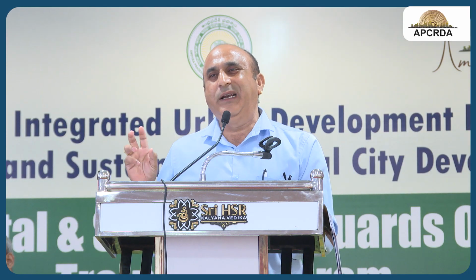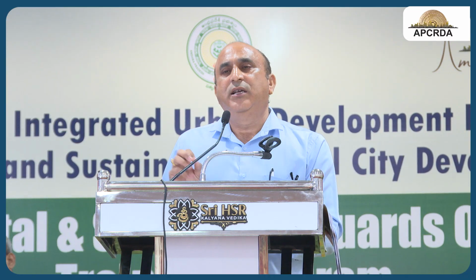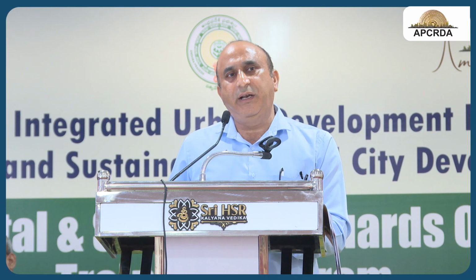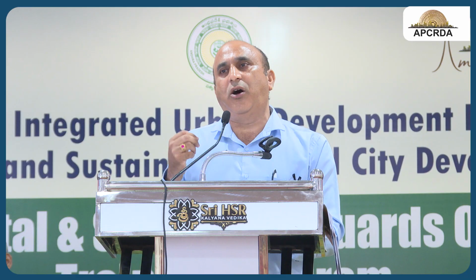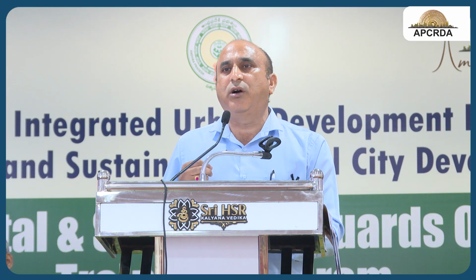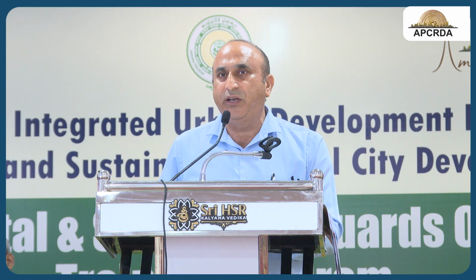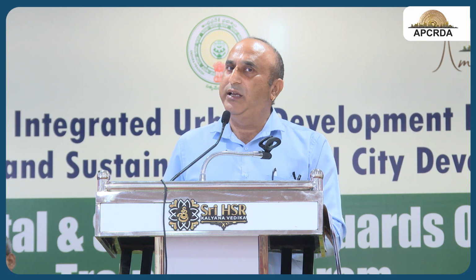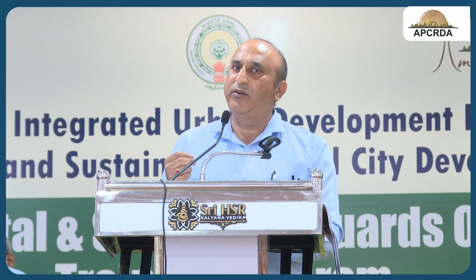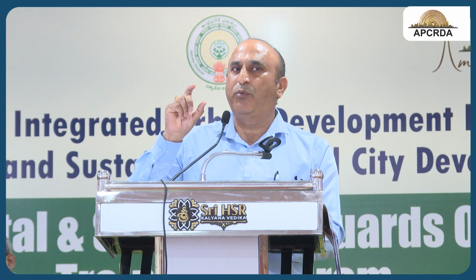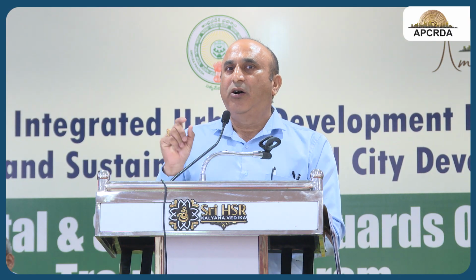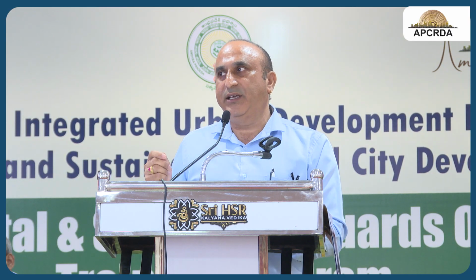Yeah, this is a statutory condition. These pictures show the environment clearances we got for the projects. Likewise, we have existing environment clearance for the existing projects. If we decide to come up with any new project activity, then you need to seek environment clearance from the Ministry of Environment, Forest and Climate Change. We call it MOEFCC. All the references and websites are in the annexures.